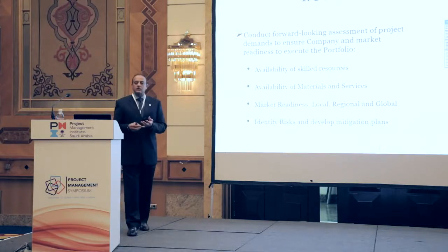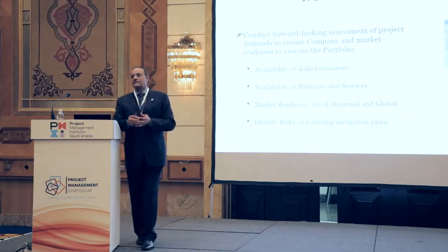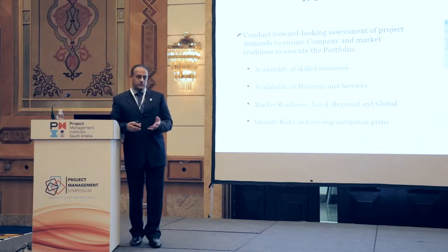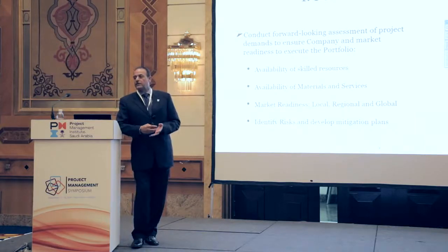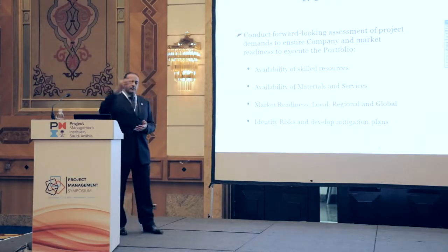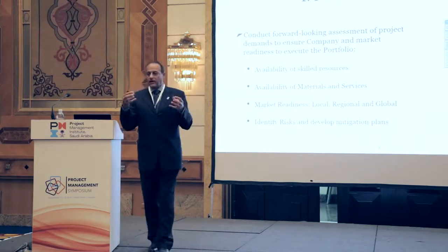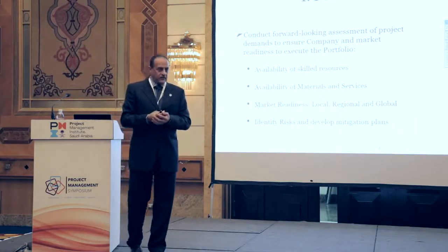Once you look at your portfolio, you make sure that you know what skills you need to execute that portfolio. If you have gaps, you need to set up to bridge them. In other words, if you have gaps in your resources, either you acquire the resources or contract with service providers to bridge the gaps. Then you look at the market. So basically you're linking demand and supply. Your demand is your portfolio and whatever you have internally.